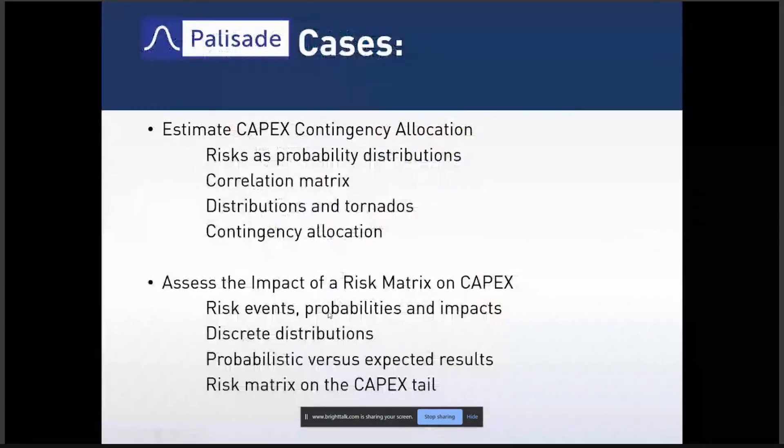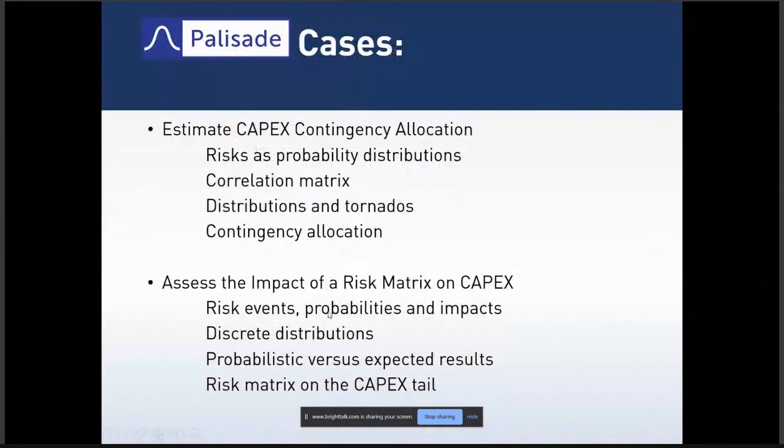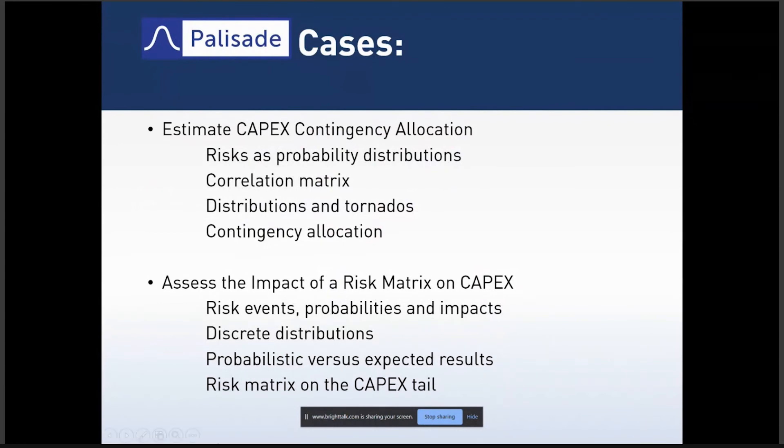We can easily map those things that come from qualitative risk analysis into a risk matrix and quantify that as a contingency, as an impact on your MPV or whatever. Those risks from the risk register will show up on your final distribution's tail. They will increase the tail of this distribution usually in a dramatic way as you can see in this example.